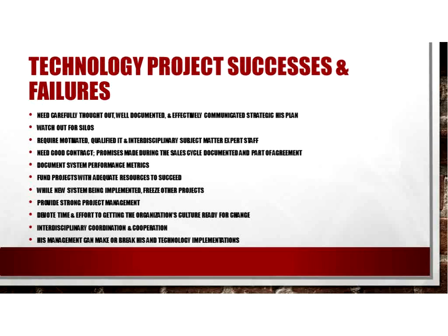The implementation plan should be detailed, making sure you identify major milestones so that they serve as a threshold for portions of payment to the vendor. Training plan, make sure you have that included, because there is budgeting that is important with your training plan. Support services.